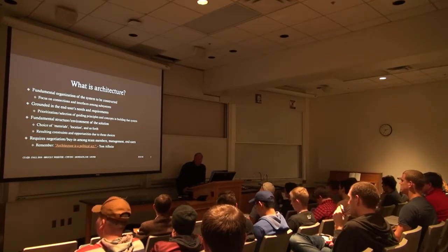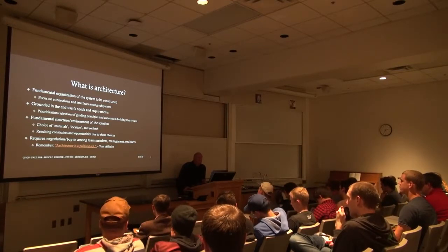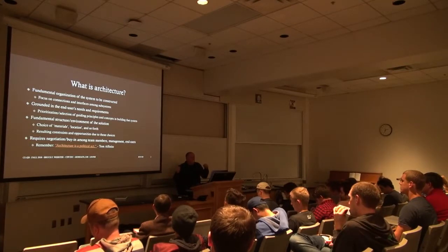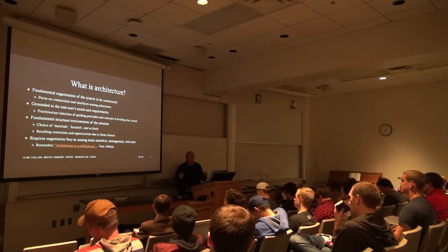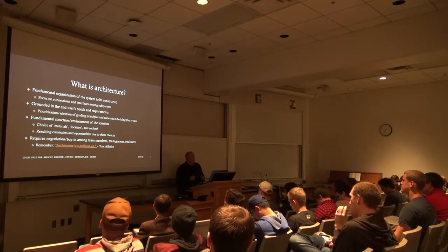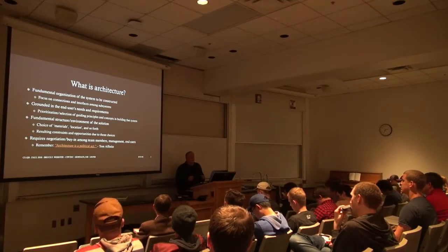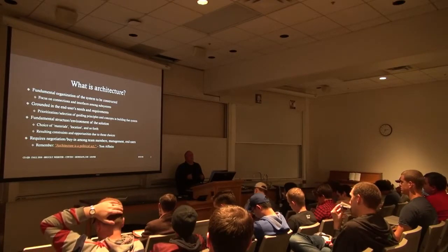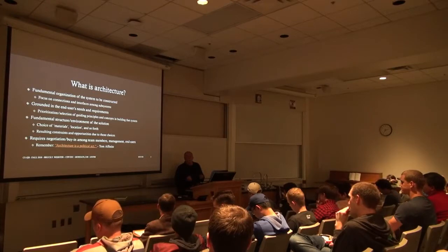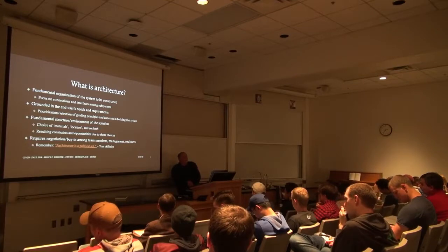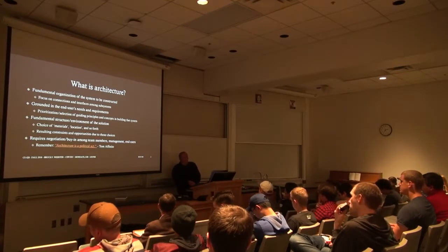The project manager needs to control the box around the chief architect. The chief architect needs to give the project manager the best possible estimate as to what the work's going to take. And like I said, I had not been in the loop on that. I should have been. If I had, and this architect had come back and said, oh yeah, 3 more weeks, I'd say, no, it's not. I've talked to the other developers. We're not 3 weeks away. We're months away. Why are you giving her 3 weeks?